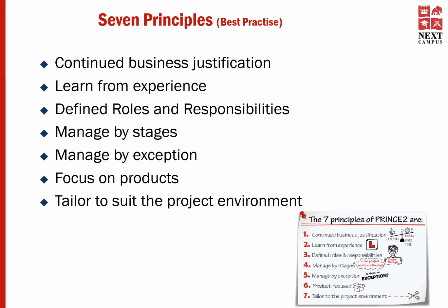We all know the importance of lessons learned and many of us write a lessons report post-project. But have you asked yourself what happens to these reports? So what could your organization do to support this? Well, how about having a lessons learned library or setting up a continuous improvement group that reviews lessons and communicates them into the right areas of the business?